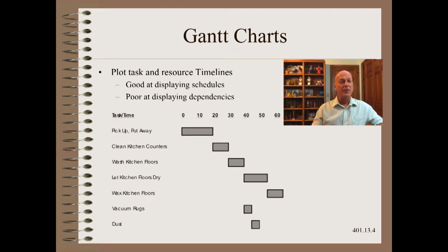The critical path, while useful, has several limitations. The primary ones are that schedules, and especially resources, are not easy to see. In contrast, the Gantt chart is great at displaying schedules and resources, but not so good at showing dependencies. No problem. Modern software can switch between the work breakdown structure inputs, the CPM and Gantt chart outputs, as well as other useful tools such as keeping track of cash flow or people's schedules.